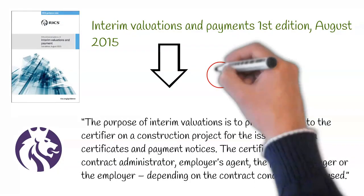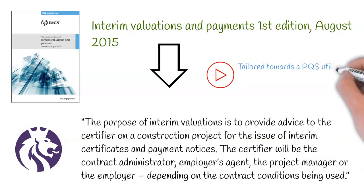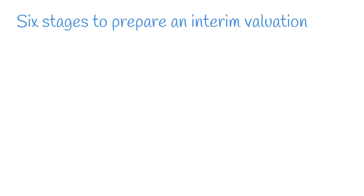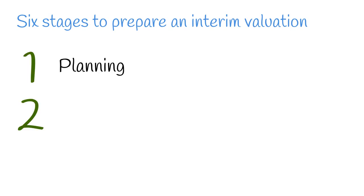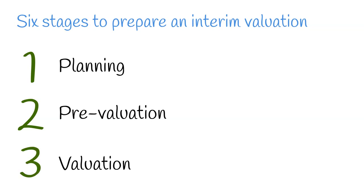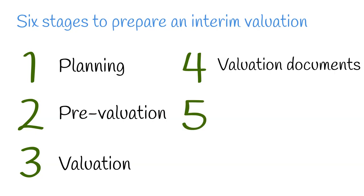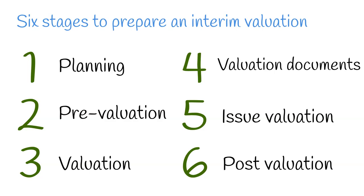This video is tailored towards a PQS utilising a JCT contract, however the below steps should be adhered to where possible to the contract being used. There are six stages to prepare an interim valuation. These include Stage 1: Planning, Stage 2: Pre-Valuation, Stage 3: Valuation, Stage 4: Valuation Documents, Stage 5: Issue Valuation, and Stage 6: Post-Valuation.